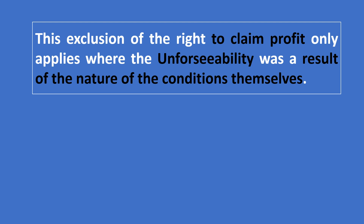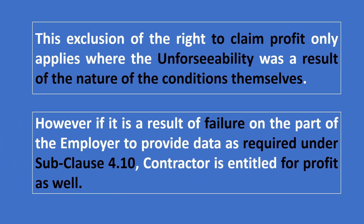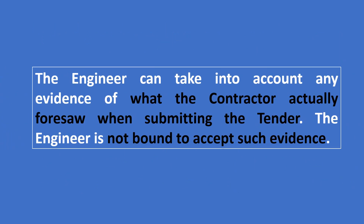The exclusion of the right to claim profit only applies where the unforeseeability was a result of the nature of the conditions themselves. However, if it is the result of failure on the part of the employer to provide data as required under subclause 4.10, the contractor shall be entitled to profit as well. The engineer can take into account any evidence of what the contractor actually foresaw when submitting the tender; however, the engineer is not bound to accept such evidence.